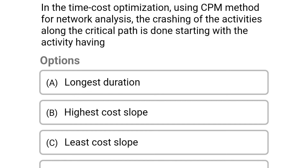Next question: in time-cost optimization using CPM method for network analysis, crashing of activities along the critical path should start with the activity having — option A: longest duration, option B: highest cost slope, option C: least cost slope, option D: shortest duration. The correct answer is option C: least cost slope.